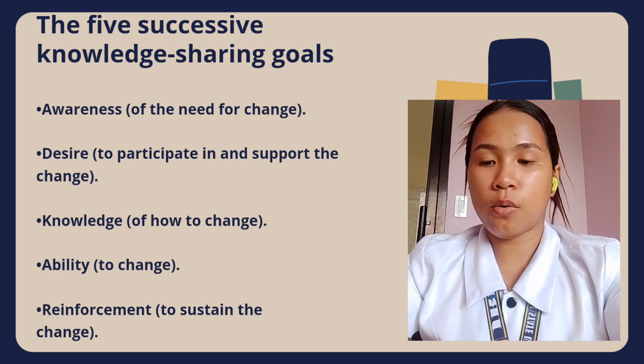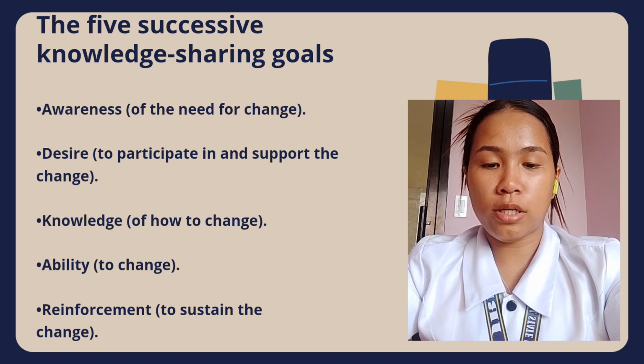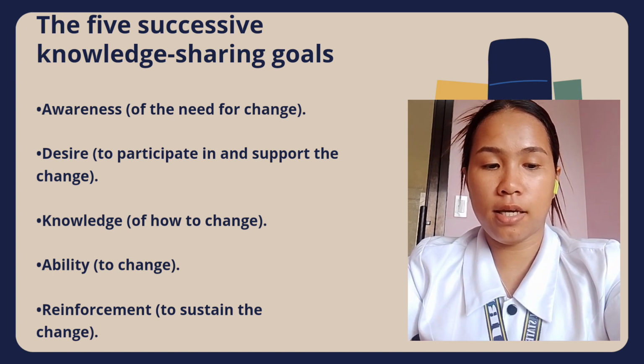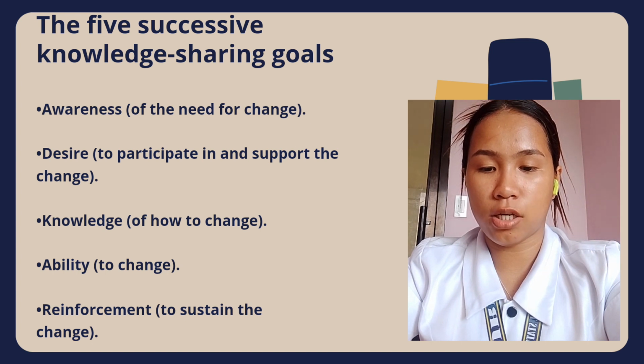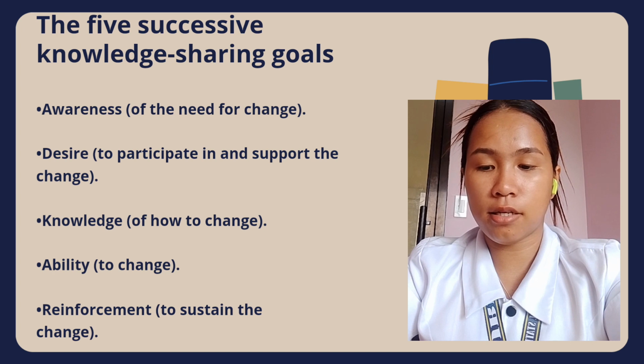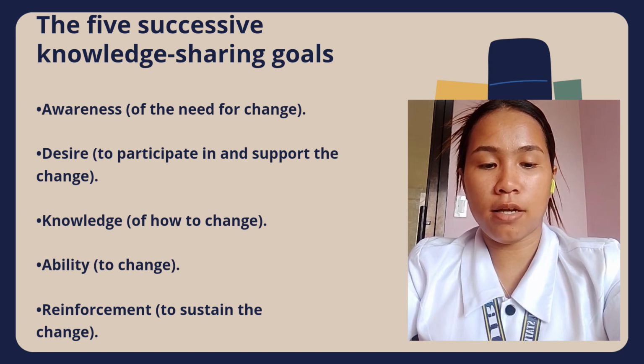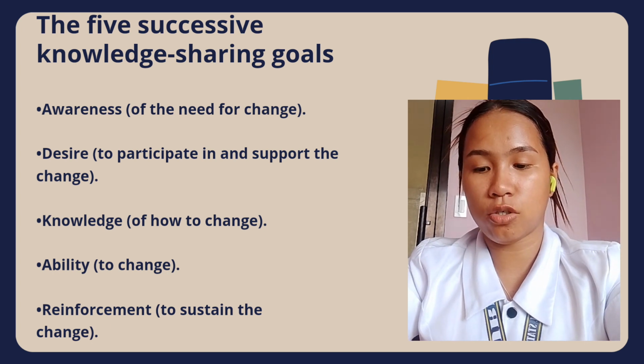So what is awareness? Building awareness of the need for change usually takes place during the business case and preparation phases of a project. You need to think about the people who are your project stakeholders and ask yourself what they need to know, understand, or experience so that they can buy into the change.